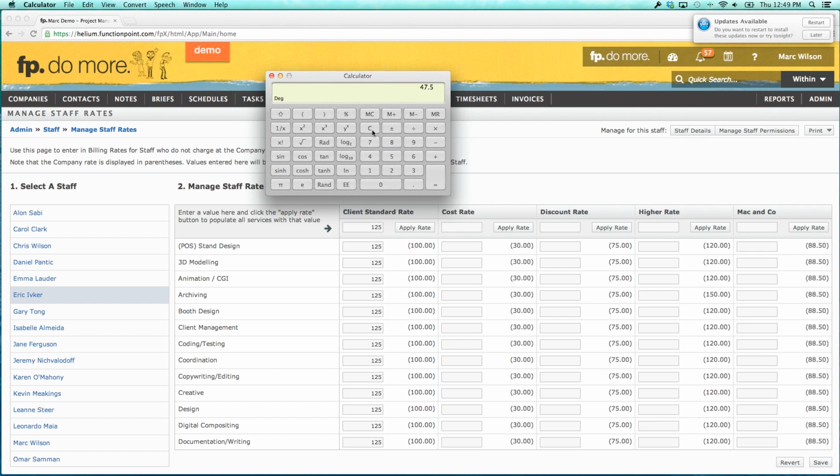How many hours of the year do they work? Or how many hours in the week do they work? Well, they work 40 hours. So 47.5 weeks times 40 hours per week, it's coming out to 1,900. Actually, I had a different value the other day when I was doing this. I guess it just depends on how many hours you decide people are working. So it's about 1,900 hours that someone's going to work in a year.